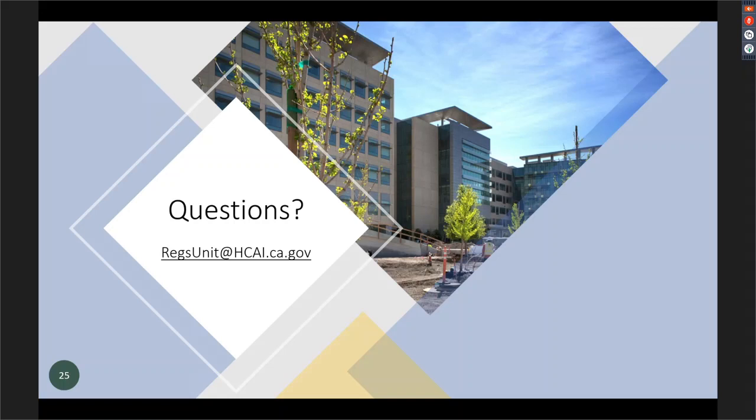We do have a question regarding the NMA log. The question reads, it was mentioned that the NMA log is a living document and that the field staff signatures are difficult to manage on that form. Can the field staff signature be on the NMA form only and the date of concurrence recorded in the log? The answer is yes. I think I said that, and it was probably confusing the issue because we were originally changing it. We got some complaints. The NMA log does not require any signature by our staff. That is maintained 100% by the design team. They maintain the log. They put what date it was approved. They put the NMA number, if it was concurred with or not.